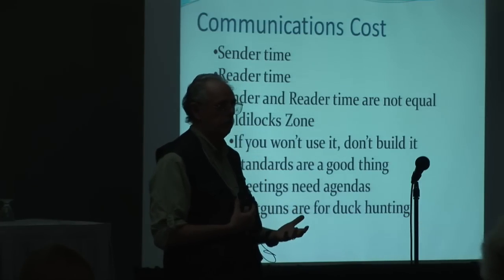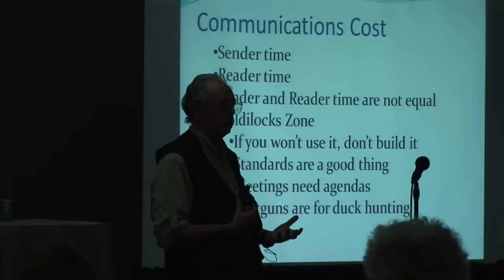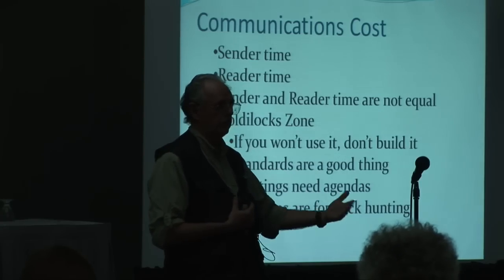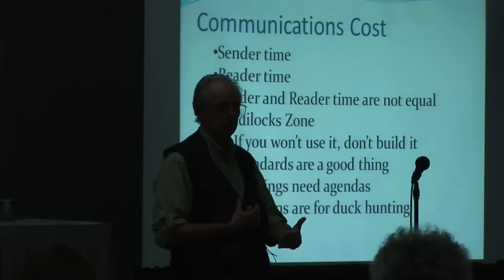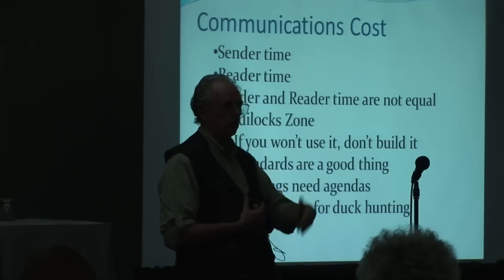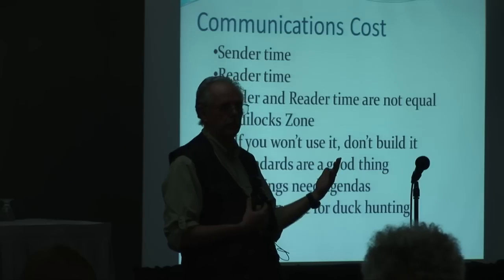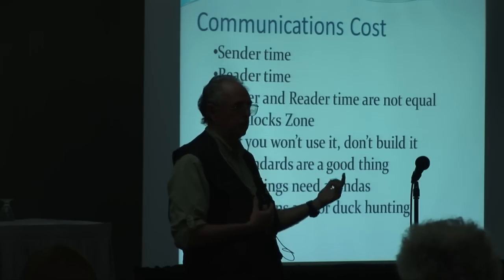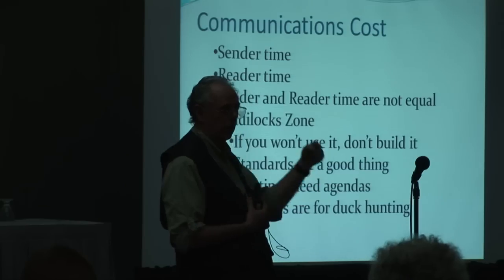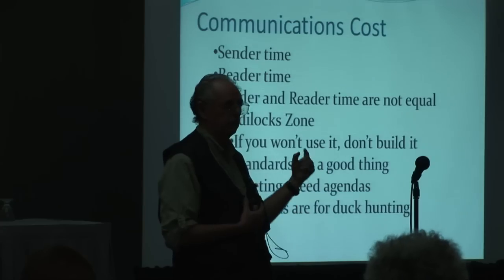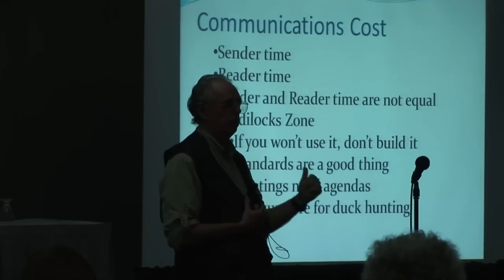A person writes an email in 3 minutes, and maybe somebody can read it in 1. But if you've got 10 people reading the email, first of all, the 3 to 1 doesn't match. And second of all, if you add up all the people reading it, that's 8 to 10 minutes versus the 2 or 3 it took to write it. What that really tells us is those lines between those nodes, it's not really a single bandwidth. There's an outward band and an inward band.